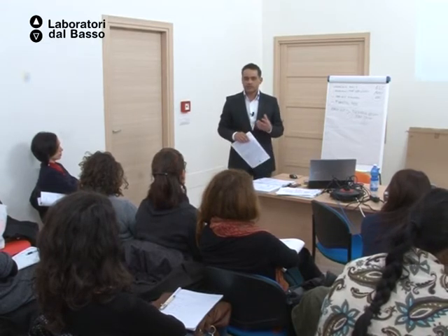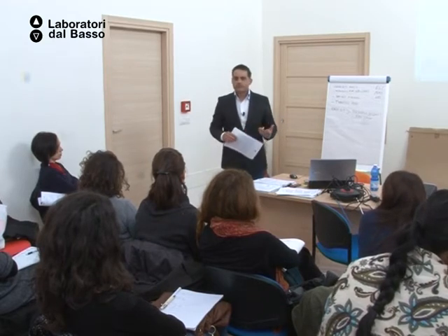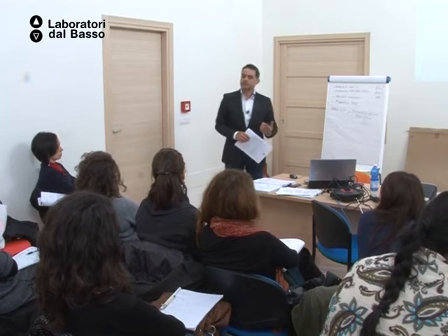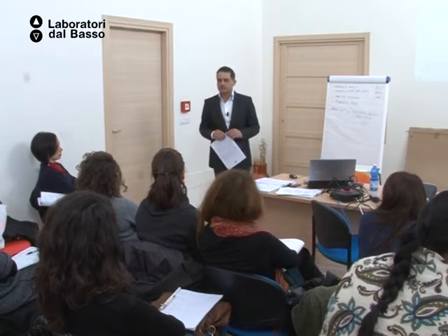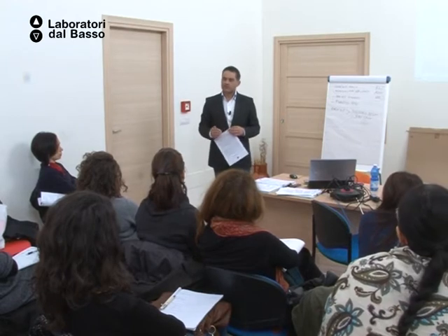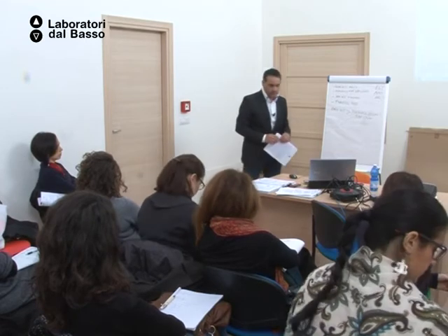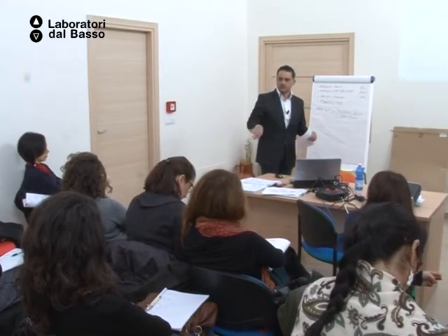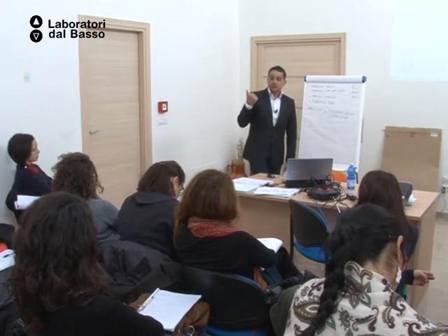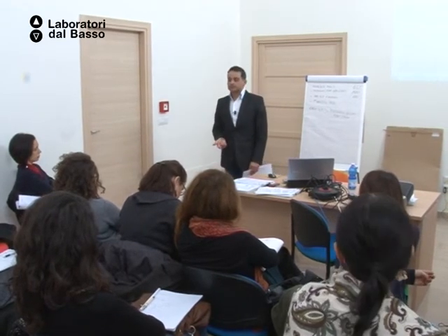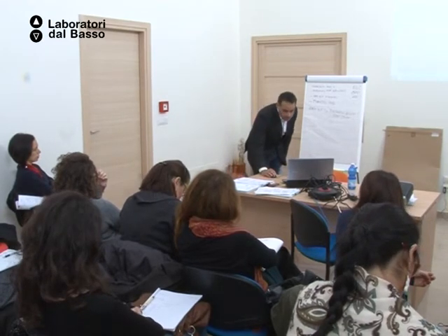I shouldn't say that, but most of the project applications I've been looking at have 50% of staff costs, and the rest depends on the project. Generally, 50% is linked to the staff, and the rest is linked to other parts of the project, such as subcontracting, equipment, and also travel and subsistence. Okay.